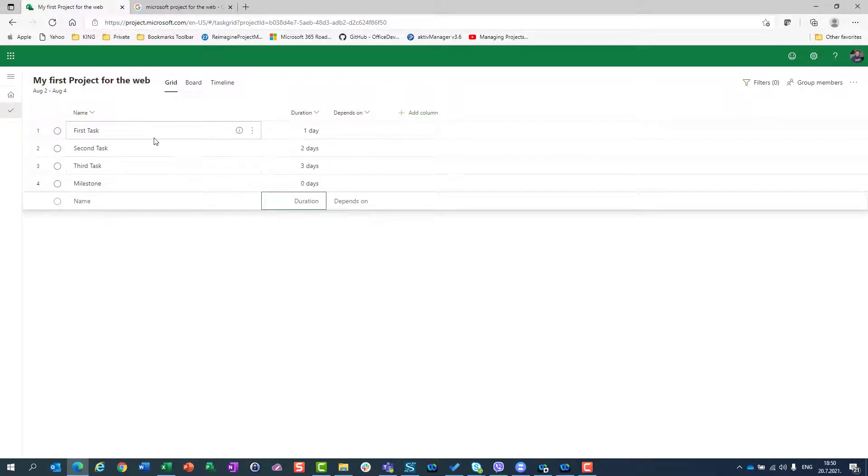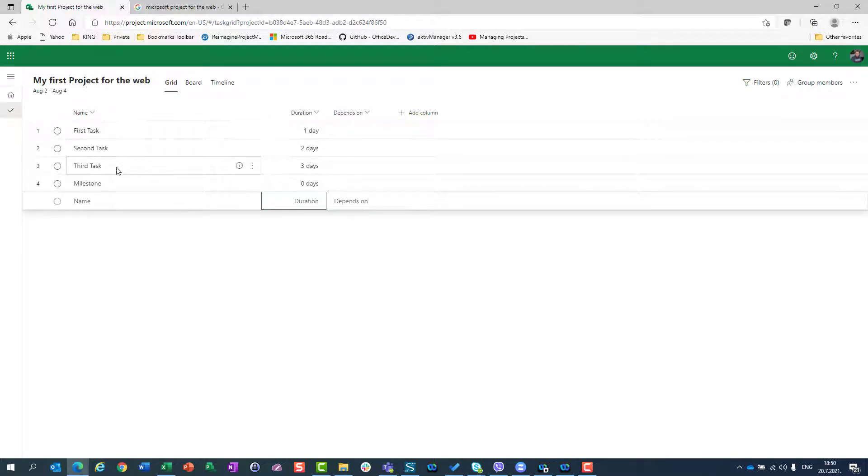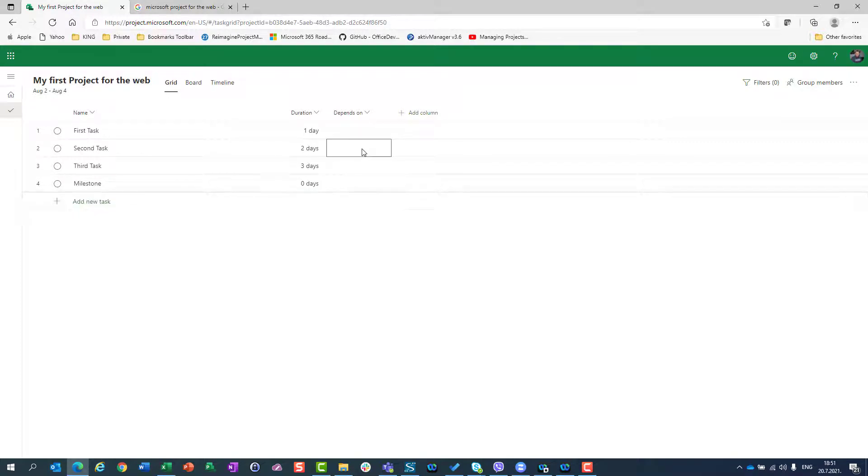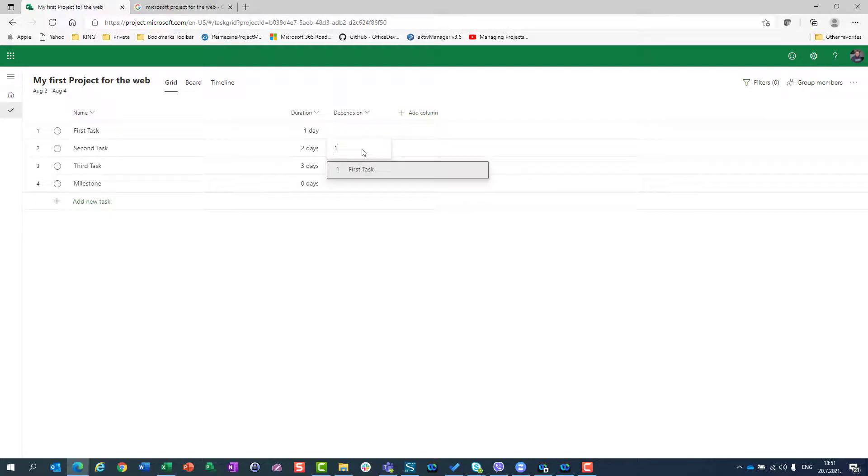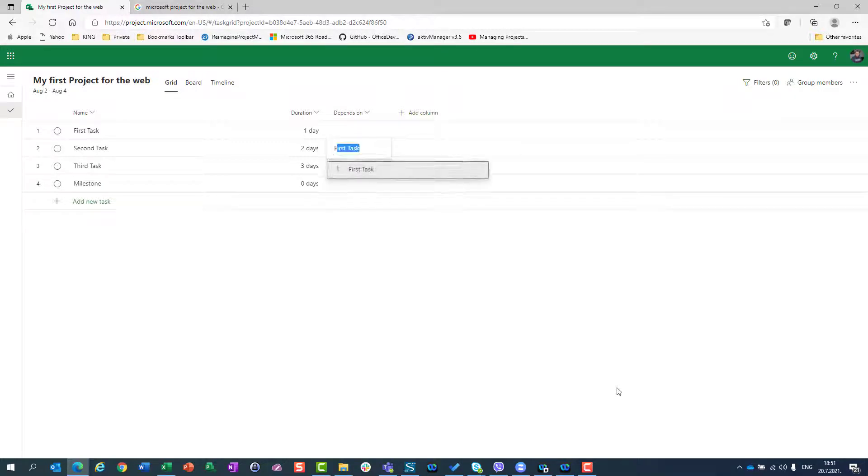But I want to connect those tasks. So I will say that my second task depends on first task. My third task depends on second task and my milestone depends on third task. To do that, I will go to depends on field and I can, first of all, hit just number one, which will give me a choice about first task. I can just also type F and I will have first task.